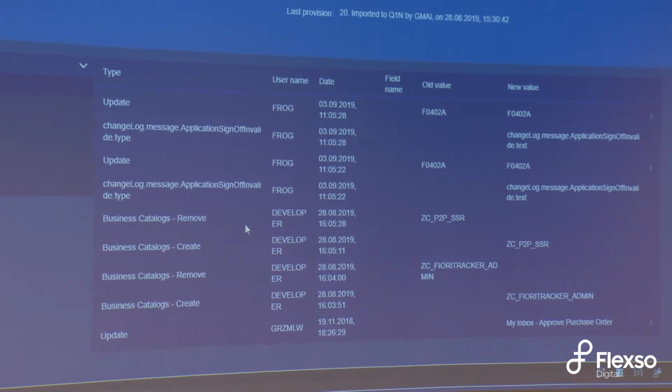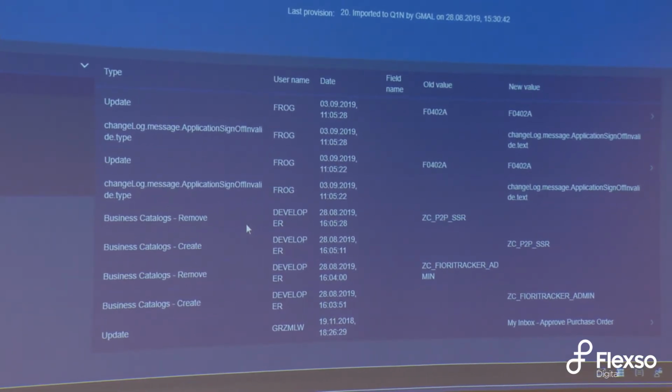Like in the agile projects, you have some late changes. Some apps are introduced at the end of the project, and then nobody remembers, okay, this is a late change which wasn't tested. It's there for 2 days, and they already expect it to work and be testable, but it was introduced just recently. So you can clearly see, okay, this app was included in scope on this particular date. It needs testing, and some additional activities, before you can expect it to work.